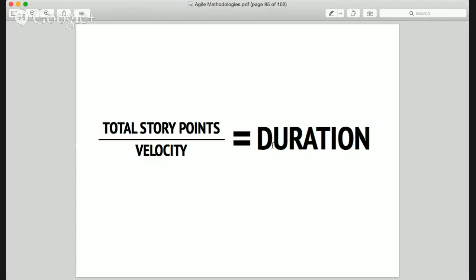What is the purpose of that? Is to calculate your team's velocity. How many story points you can finish in a duration. That's the measure of how fast you are as a developer in your own relative terms. You can't say that you're faster than another team because your velocity in story points is higher, because story points are relative, right? Doesn't make sense. But it helps you estimate how long it's going to take you to get something done.